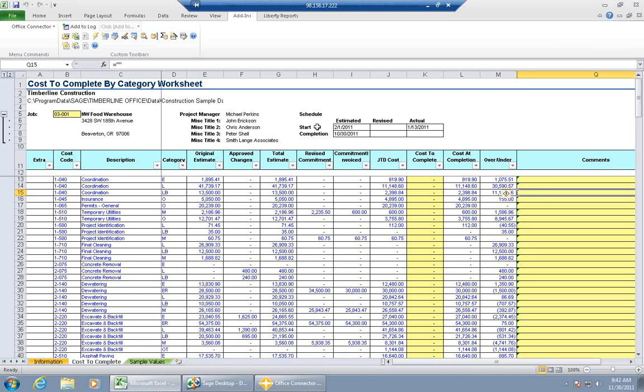The other thing about this, too, is that, as you know, when you're writing this information back to the cost to complete or cost at completion fields in the miscellaneous worksheet, they overwrite each other, so there's no history maintained there either. So the only way you're retaining the history is by saving a static copy of this sheet. That becomes an important piece of historical data over the course of the job. Any other questions? Okay.